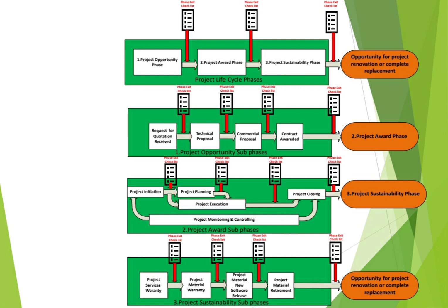Also for your cost baseline, as we mentioned during the initiation phase, you already have the legal contract, the approved contract, and you have also your tender team sharing with you their basis of the estimation for this project, the cost, the expected margin, and the selling price. All of this, if your company has a system, you need to log all of this information inside your system.